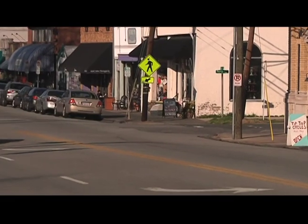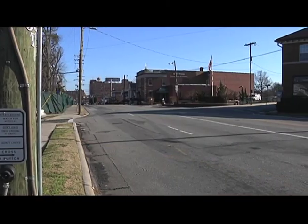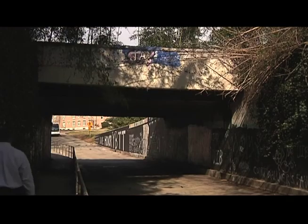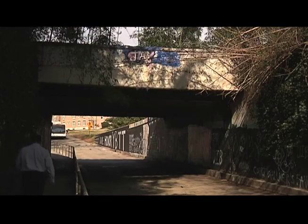And the repaving would extend from 9th Street to Buchanan. So very definitely toward the end or at the end of the project. And it would be at the end. Obviously the first thing is the city's waterline project. That would be followed by the bridge project, and then when that's completed and open to traffic, the repaving would